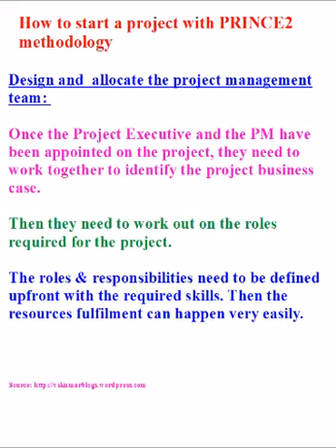Then if you see the project executive, he also should be in parallel to the PM. He needs to continue till PIR or closure of that project. So these two roles will be lifelong for the project. They need to continue. And if you see some of the technical leads or developers or business analysts, depending on the activities and on a need basis, we need to recruit them and nominate them for the project under that role.